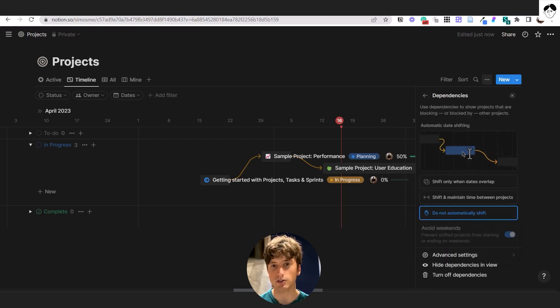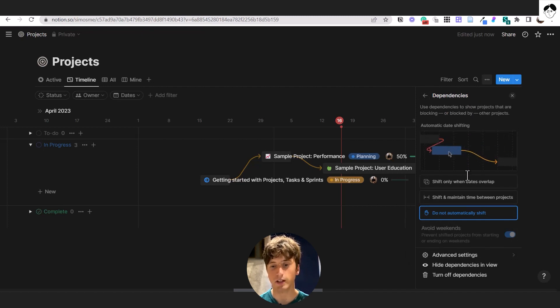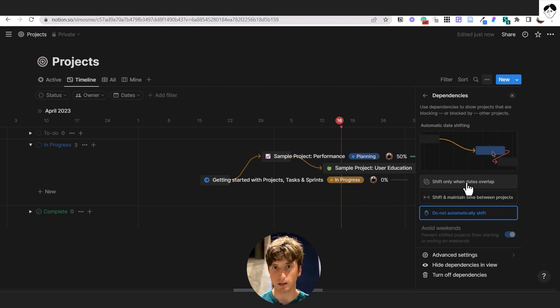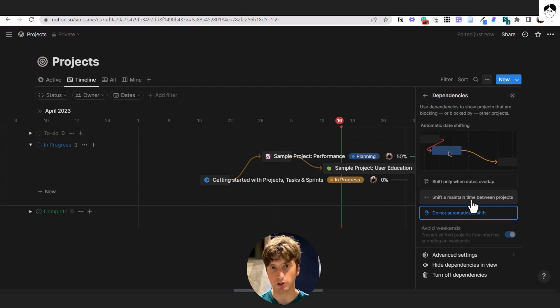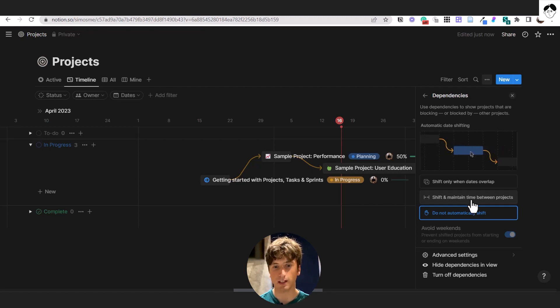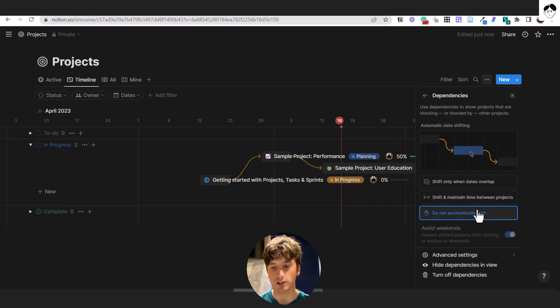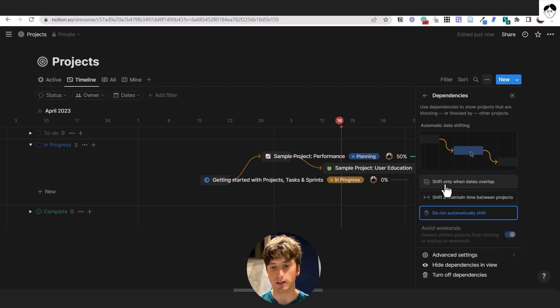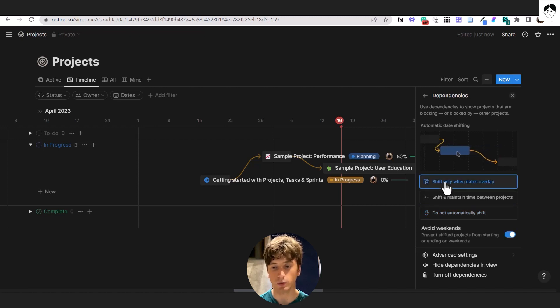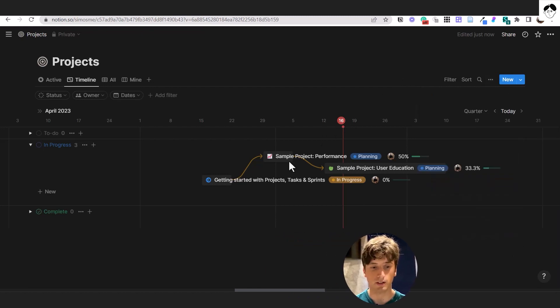And that unlocks this view on the dependencies tab that enables us to define if you want to shift only when the dates overlap between dependent projects in this case. If you want to shift and maintain time between projects. So the same time lag, or if you do not want to automatically shift dates when they change. We can also avoid weekends here. So by default, it's going to be do not shift. But let's try these options here. Let's do shift only when dates overlap. And we want to avoid weekends as well.